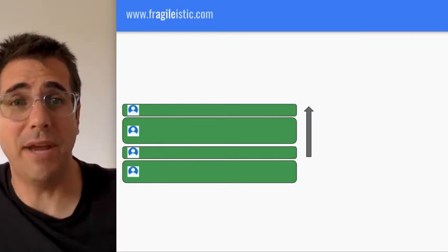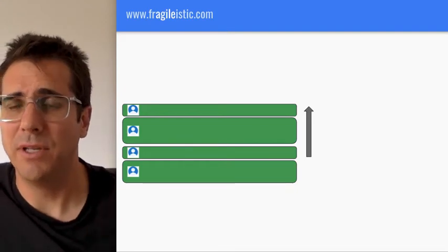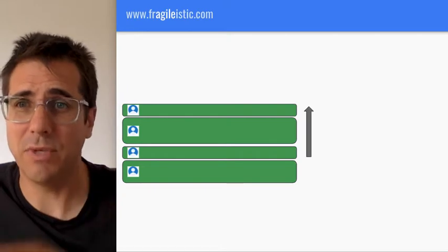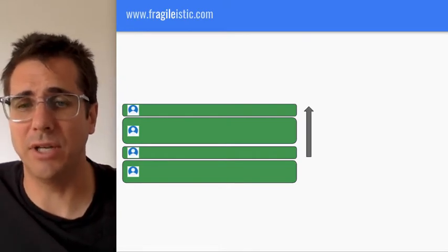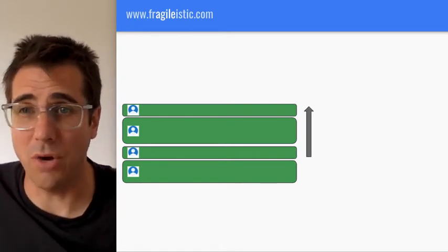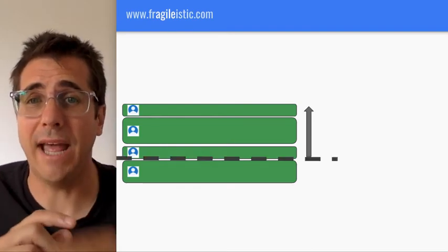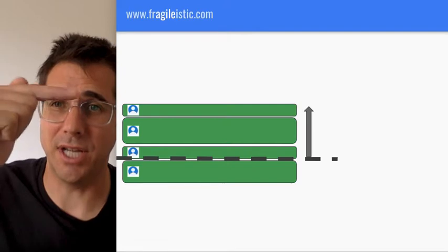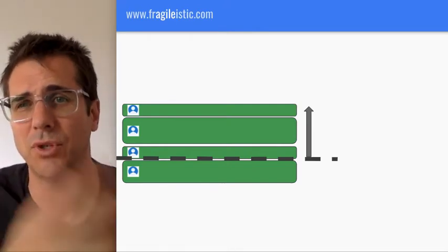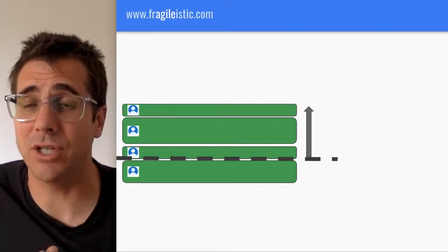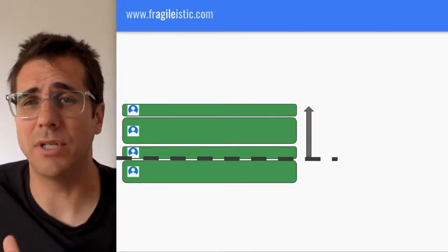Okay, so here we have a backlog. This is the backlog that we groomed in the last video. It's all ordered, we've got them sized, and all we do is we say, hey team, how much can we get done in this sprint? And there's no half done, we can't put the line halfway through a thing. We go, we will get 3 things done based on the size, based on our velocity in the past, and we'll do velocity and stuff later. Those are the 3 things that go into this, and that's the next iteration of work. Those 3 user stories. That's what we've done.